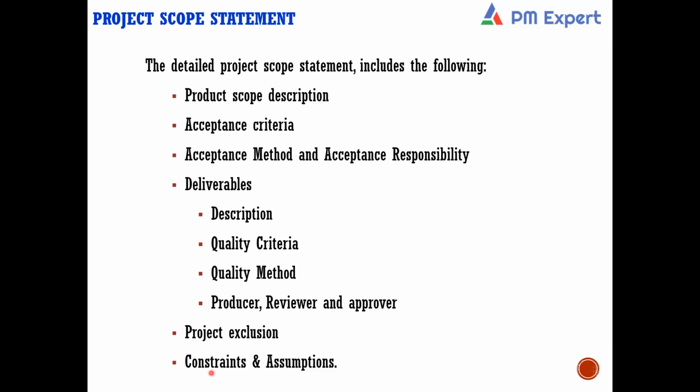For example, the licenses for all the tools required for development would be supplied by the customer. Right? Or the cost for the licenses and the tools to be used will be provided by the customer. Is it an assumption? Yes. All the user interface guidance, right? All the user interface or UI related guidelines will be provided by the customer. Is it an assumption or not?